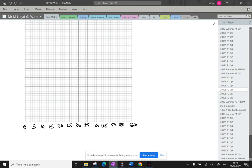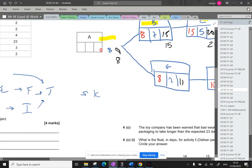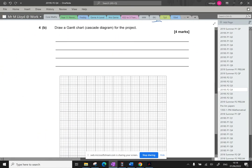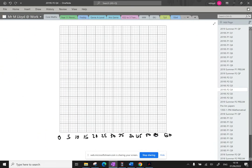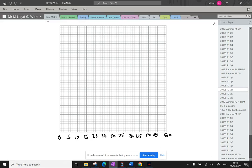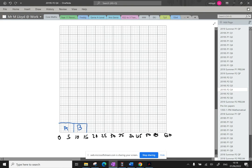Okay, so A, B, C, D, J, and K. So A is going to be at the bottom and its duration is eight. And that's moved. Oh, this video. So I'm going to come into here. I'm going to change this to an actual pen. So that in there is A. All right, I should know my critical path, actually. So B is next. It's got seven. So two, five, that goes to 15. That's for B. C has got five for the duration. So that takes us to 20. So C's in there. D is 18. So 10, 15, 16, 18. There we go. D.